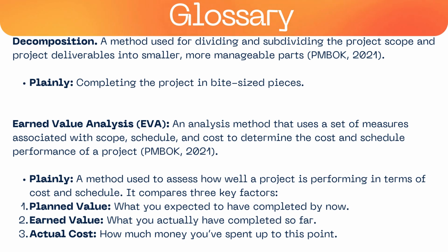The planned value, what you expected to have completed by now; the earned value, what you have actually completed so far; and the actual cost, how much money you've spent up to this point. This is a major one, and I would definitely put an asterisk on this: you need to know your EVA because you need to be able to evaluate your planned and earned value against your actual cost.